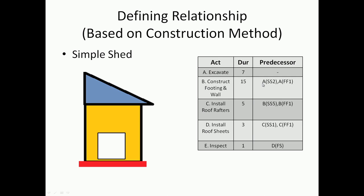Here we have a start-start relationship and a finish-finish relationship. I will start excavation, and after two days of excavation I can start constructing the wall and footing. This is the relationship I am defining, and the wall and footing can finish only after one day after excavation is complete - that is how the finish-finish 1 is defined here.